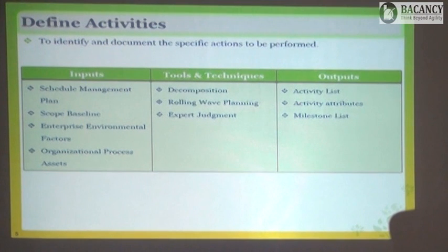And your milestone list. Each and every work package must have a milestone at the bottom which will represent the completion of that, and when all the milestones are achieved, then you will say, okay, our project is delivered. Any questions on this? Easy? Fine?